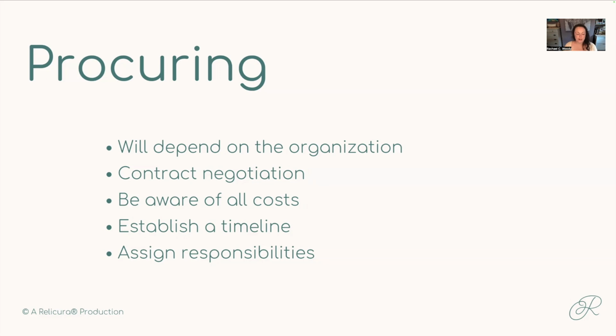And one area I see that helps with negotiations is if you know you're going to be with the product for at least 5 years, which nobody wants to switch systems more than every 5 years, trust me. The longer you commit to that product, sometimes the cheaper that annual rate can get. So, for example, if the contract negotiation was just 12 months, it will probably be very expensive for that 12 months.